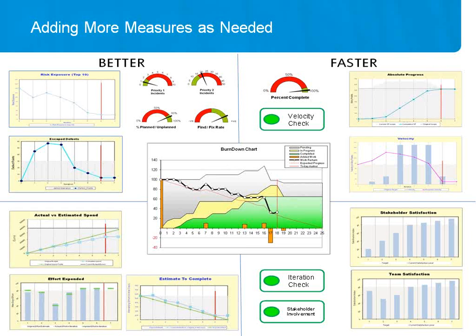My experience is they tend to look at those when things are new. Once everyone's got used to iterating and have got good relationships, then they might find those questions and some of those tools just to be a little bit of overhead. So it's a good idea to have an indicator whether you're getting enough stakeholder involvement. Often the stakeholders won't engage, which makes our iterations far less effective. And I like to have a formal assessment on the iterations where we have a pass, at risk, fail kind of system, so we can just have an iteration check on how we're doing.